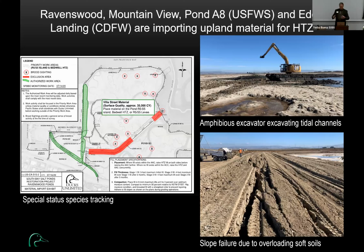So there's already competition amongst those 4 sites themselves, right? And the model that we've been using is a dirt broker model where there's contractors out there that try and source this site, and then they'll bring it to us and we get it at no cost. So if you look at that construction triangle where you have money, you have quality, you have time, we're picking the money and the quality and they get the time.